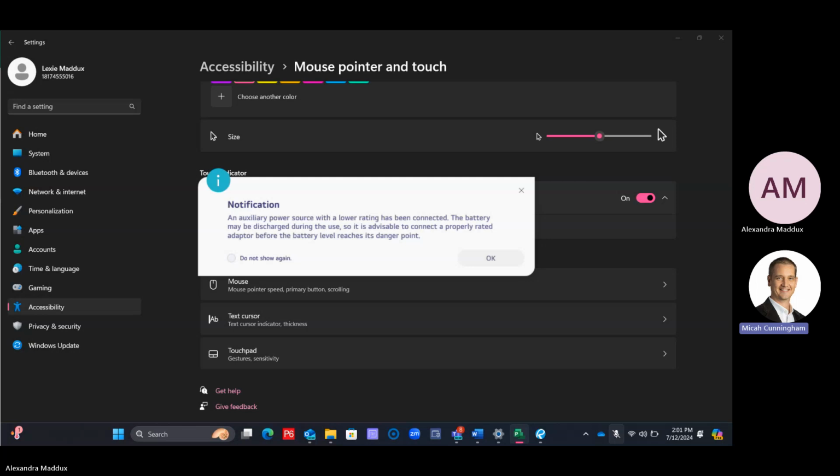So now if I collapse this, I right click and copy. I just collapsed the grouping, right click and copy. And if I scroll down here and paste it, it's still going to be tied in to the building pad for building A. So then I would need to change it to the building pad for building B. Okay, does that answer your question? Okay, we can go over more later too. We can duplicate our building and go through that process. Oh, that's right. Okay, yeah, we can go over that then. We won't do that today.